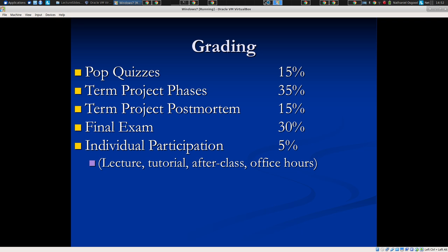It's actually a lot easier to estimate in small pieces. We can fool ourselves really easily when we're estimating a whole swath of things. Turns out it's much easier to test and debug if we have fewer things which have changed for delivery. We can narrow down where that problem might have come in because we've mucked up fewer lines of the code base. We can better understand prioritization once we have something to show to the stakeholder and they look at it. Often they get a clearer sense, even without changed needs, of where their priorities are different. They actually see something tangible and they say, oh, that's good enough. I thought we'd need more of it. That actually looks so good.